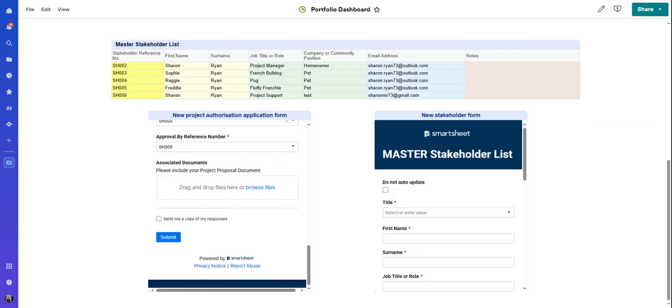Have a Gate 1 dashboard where you put the basic proposal, a Gate 2 dashboard where you go ahead and fill it out with more information if the Gate 1's authorised, and so on and so forth as you gather more information, more evidence, obtain the funding, do the processes that your organisation wants their project managers to go through before a project comes live. Particularly identifying the outcomes and the benefits, and how can you record those? How can you ensure that at the end of the project you can evidence that it did good work? These are all things you can think of in the design of your project, and something we would discuss in order to make your project dashboard perfect for you.